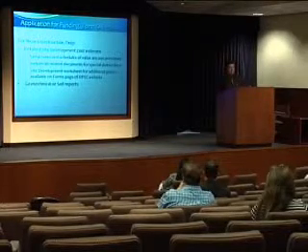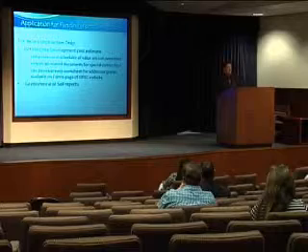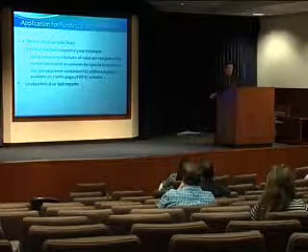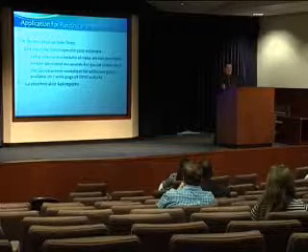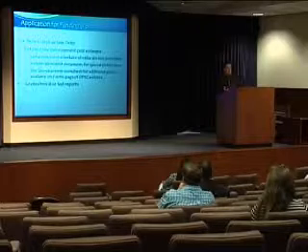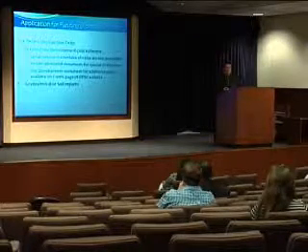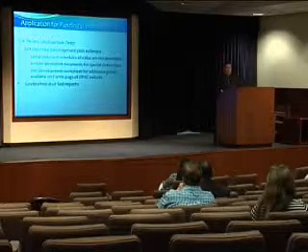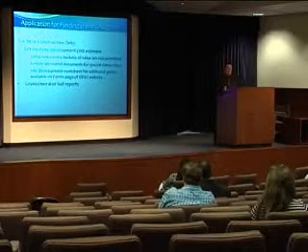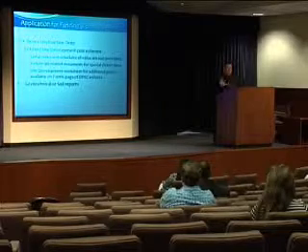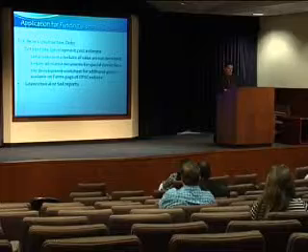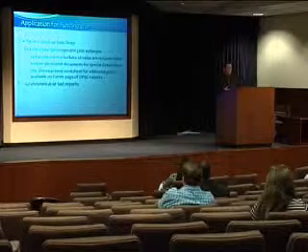All right, the following slide is going to be going over new construction project elements only. So for a minute, we're not going to be discussing things that are needed for the modernization projects. We need a detailed site development cost estimate. The plan verification team has developed a cost estimate worksheet that is quite useful, and it is available off of our website. No lump sums and schedules of values are permitted. We need that site development worksheet, which breaks out each element of the cost estimate. Include all related documents for special district fees.